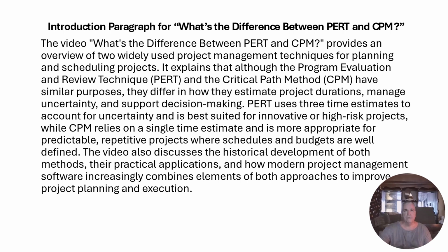It uses a single time estimate for each activity to identify the critical path, which is the sequence of tasks that determines the shortest possible completion time for the entire project. If any task on the critical path is delayed, the entire project is delayed unless corrective action is taken.